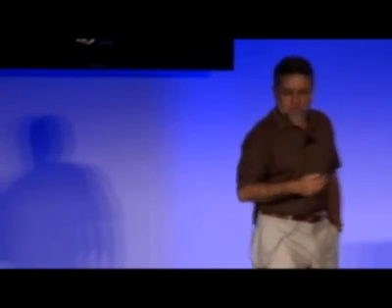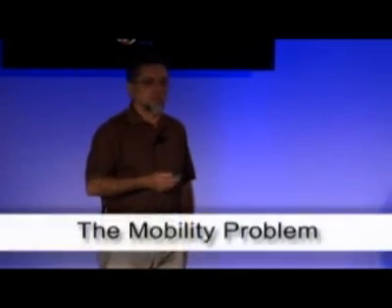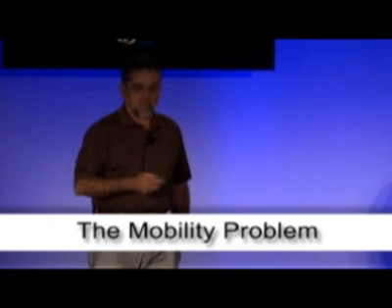Planners and schedulers would now review and correct incorrect data. They'd go in there and say, how can they charge 10 hours to this operation? It's supposed to be a 1-hour operation. They've got 10 guys on the crew, somebody fat-fingered data entry here. So the schedulers would have to review the data to make sure it's correct. And then the schedule was updated and released. Painful process.